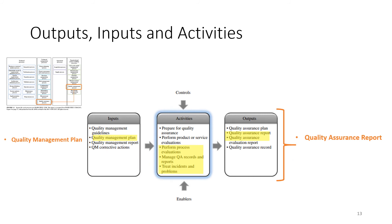The quality assurance process is a simple process. The input is the quality management plan. Then auditing and inspection of the quality of the process takes place, and the result is a quality assurance report. So the input is the quality management plan and the output is the quality assurance report.